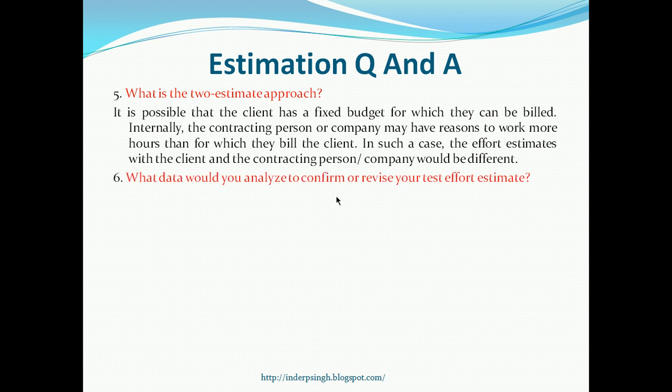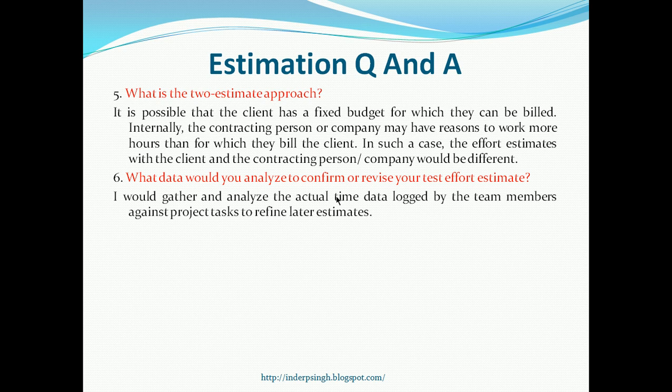Next, what data would you analyze to confirm or revise your test effort estimate? It is important to keep track of the actual data you are getting when testing is going on. So what you need to do is look at the actual time that is being logged by the testers in your team, so that you can find out if there are any surprises, and you can use this data to refine later estimates so that your later estimates can become more accurate.